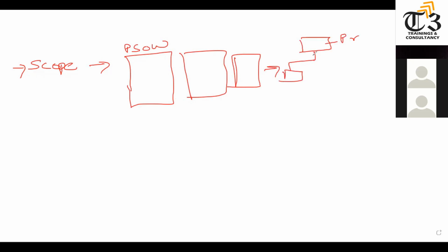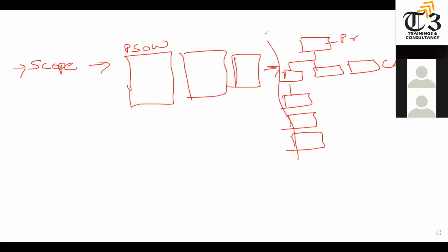The second level will be the control account, which is used for costing purposes. And control accounts, if you guys remember, include work packages plus contingency reserves. And inside the control account, we will have work packages. The lowest level of the WBS, they always ask this question. The lowest level of the WBS is always a work package. It can never have an activity inside the WBS.